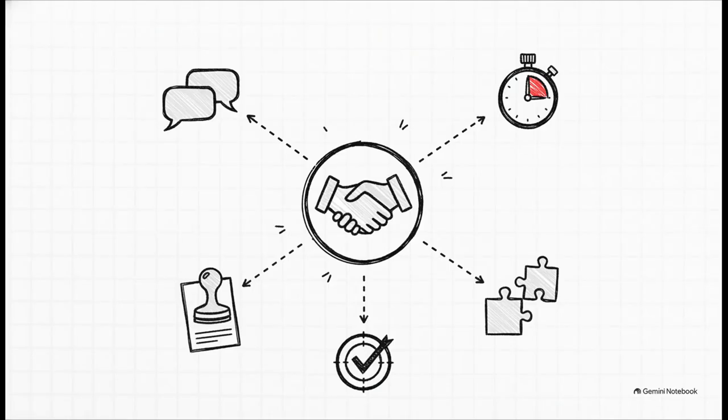Applying some solid communication best practices here is exactly how you overcome people's natural resistance to change. We need to be proactive, identify changes with stakeholders early, get sponsor approval before anyone starts doing the work, and communicate what's happening fast. We also want to find solutions that keep multiple parties happy and use a strict time-based resolution model so issues don't just sit there gathering dust. Deliver on your commitments and you build the trust you need to survive disruptions.